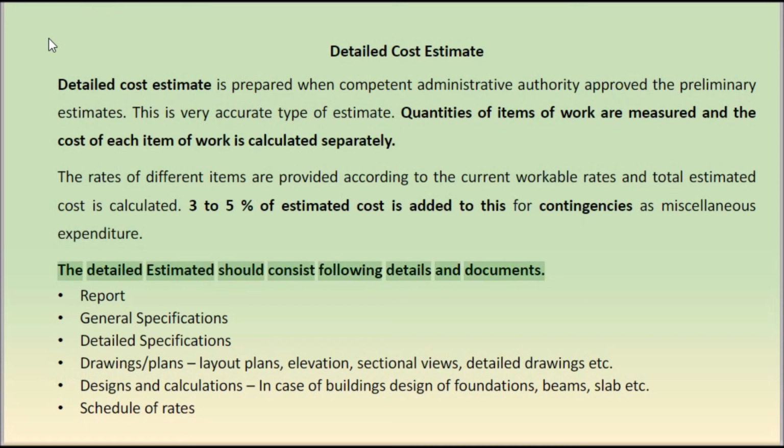The detailed estimate should consist of the following details and documents. Report. General specifications. Detailed specifications. Drawings, plans, layout plans, elevation, sectional views, detailed drawings, etc. Designs and calculations in case of buildings, design of foundations, beams, slab, etc. Schedule of rates.